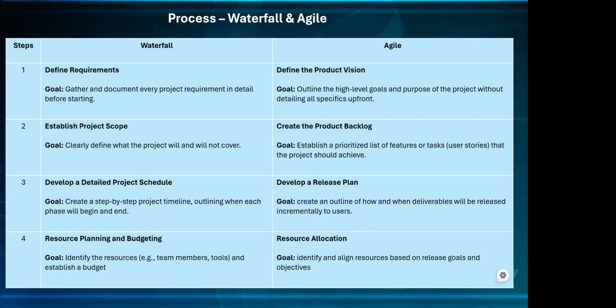Let's assume that for the first 2 weeks in November we just want to gather requirements. While we're gathering requirements, we have the BA already, the PO is there. If we don't have enough resources in the organization to fall into those roles, the line manager will be recruiting for the developers. Remember, because we're just gathering requirements, the people doing that are not necessarily the developers and the QA, so you can be recruiting for them.